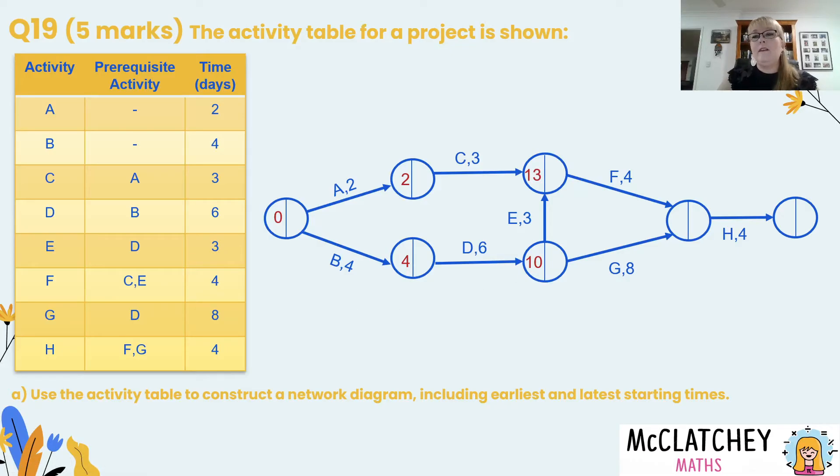So that means we're going to add the largest one through, that'll become 13 in that vertex. Now we can keep moving forward in the network. We've got another choice again. Do I add 10 plus 8 which would be 18 or 13 plus 4 which is 17? As I said before we need to put the largest one in there then we can finish the project on 22 days. So we forward scan, these are our earliest start times.